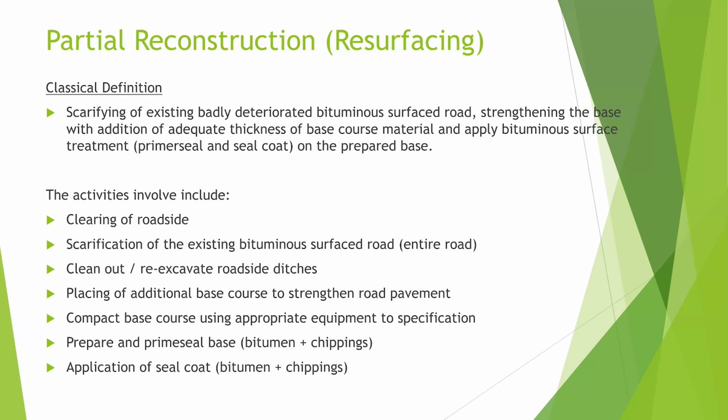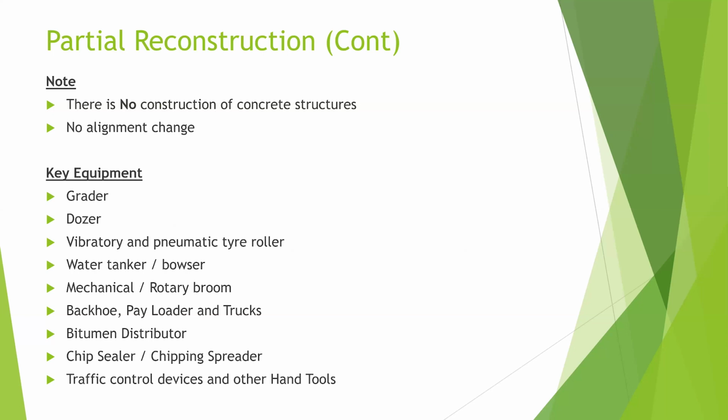Now, the activities involved here include clearing and then the scarification that we all know. And then you clean out and improve drainage, and then you place the additional base course to strengthen the road pavement. You compact and prepare the surface to receive Prima seal and seal. As I did indicate, here there is no construction of concrete structures and no alignment change.